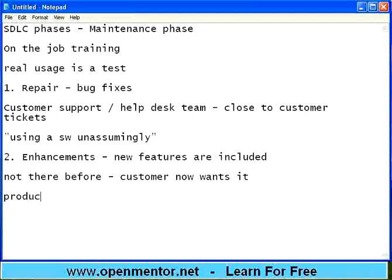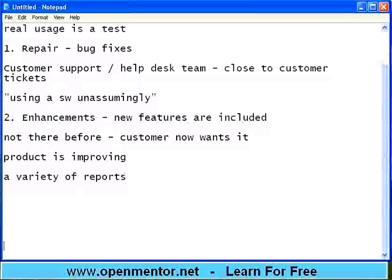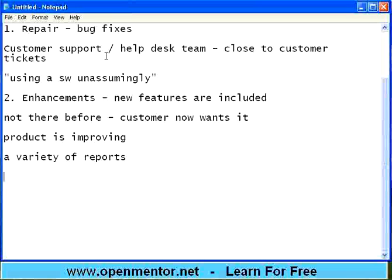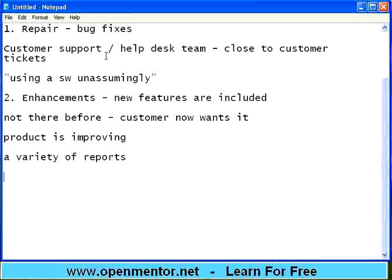This is a good sign — it means the product is improving. Customers may need a variety of reports. Depending on management requirements they will say 'I need this report that wasn't there before.' Or a workflow change — take a bank: if previously loan approval required two levels of approval, and now they want a third level for amounts over 200,000 — if this wasn't programmed before, it needs to be done now. They call this a change request.